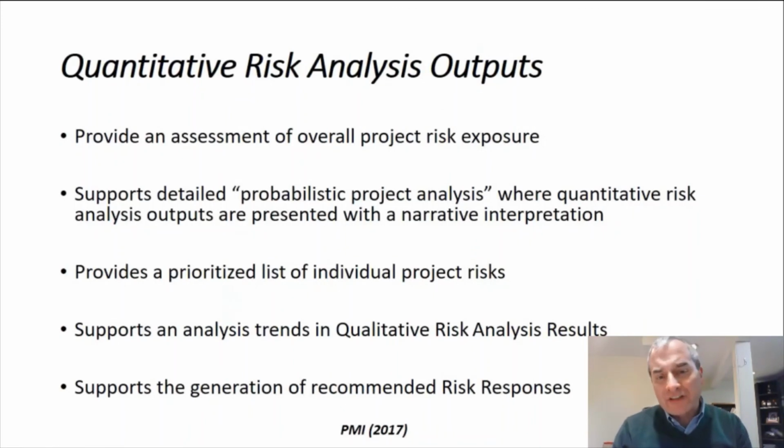Now, quantitative risk analysis outputs provide an assessment of the overall project risk exposure. It supports a probabilistic project analysis where quantitative risk analysis outputs are presented with a narrative interpretation. This provides a prioritized list of individual project risks. It supports an analysis of trends in quantitative risk analysis results. It supports the generation of recommended risk responses.